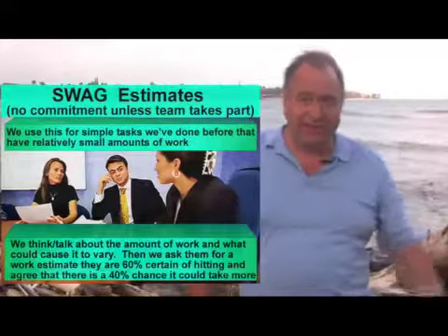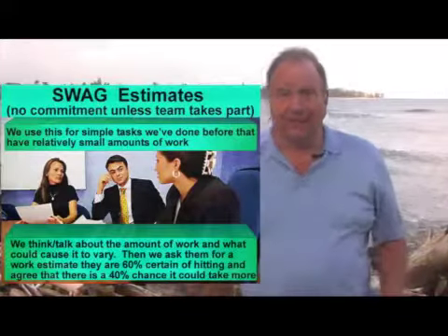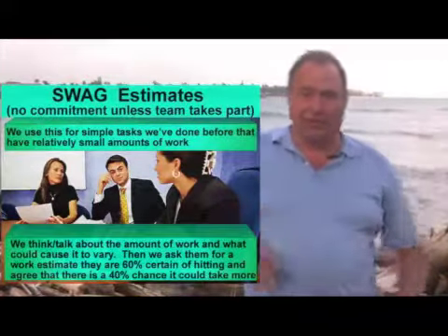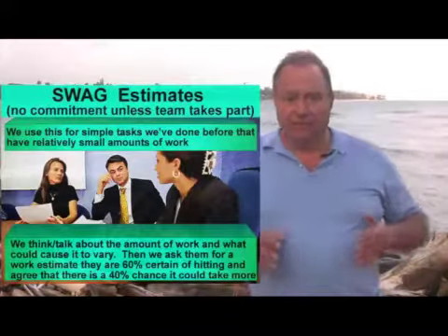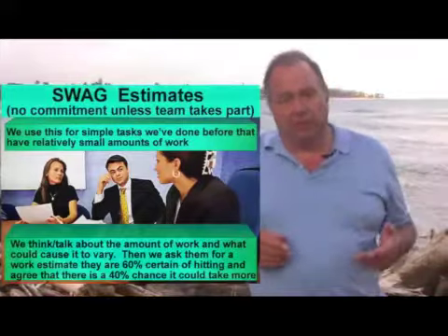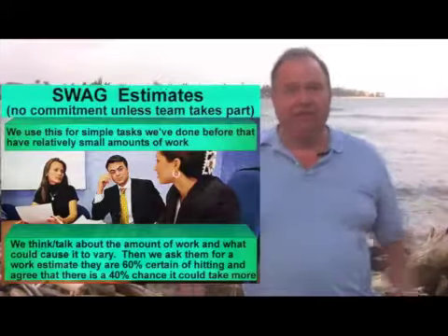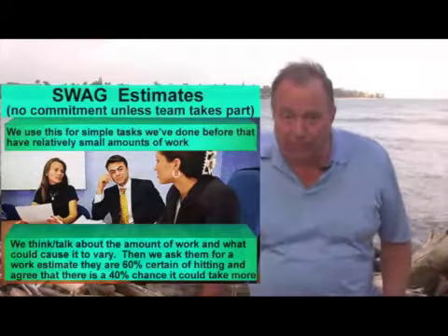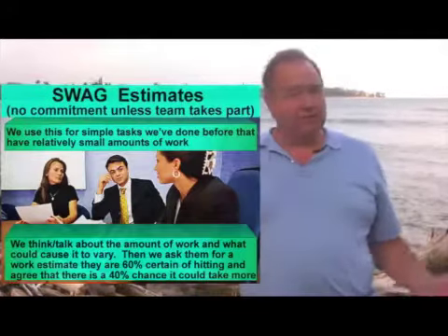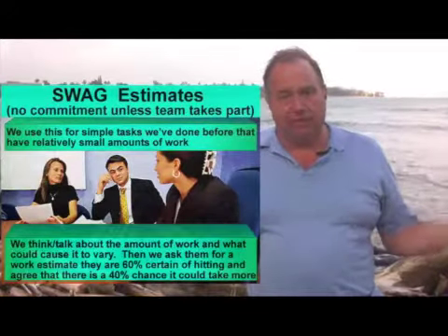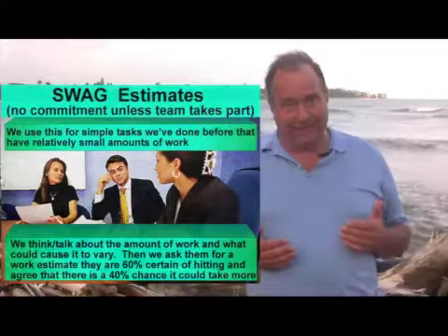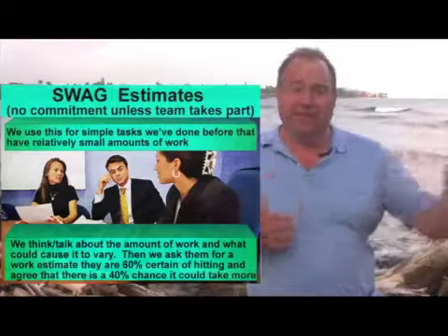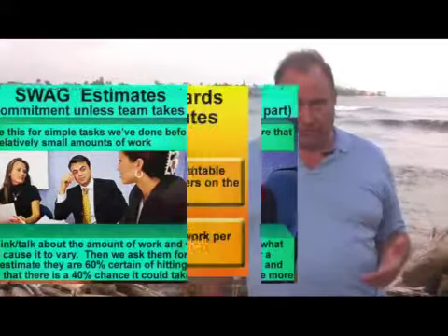Hey, how long do you think that's going to take? Maybe 2 days. All right, break it down a little bit for me. One day meeting with the managers, one day putting together the document and getting their approval in the afternoon. Say fine, 16 hours of work, and we have a SWAG estimate. We've done not much work, but we have engaged the team member in setting that number. They feel it's their number. It wasn't crammed down their throat.